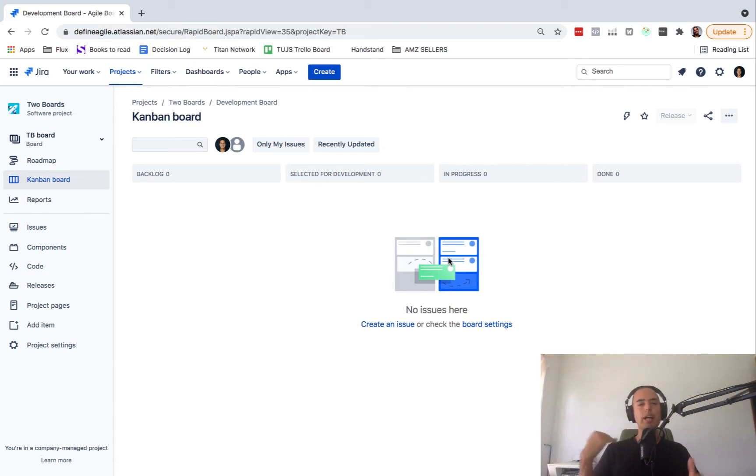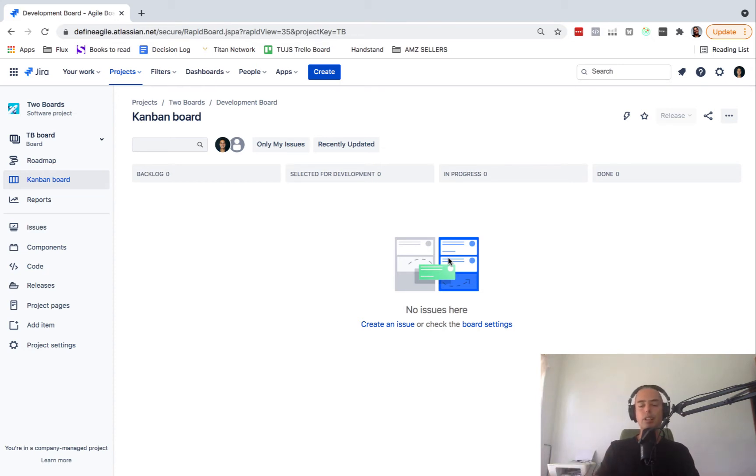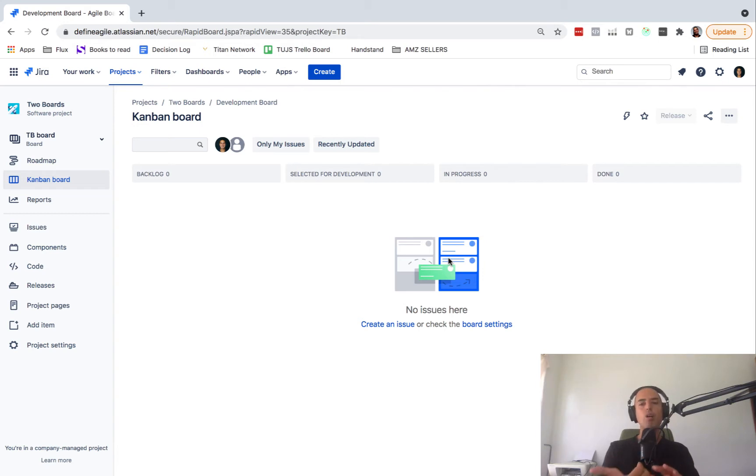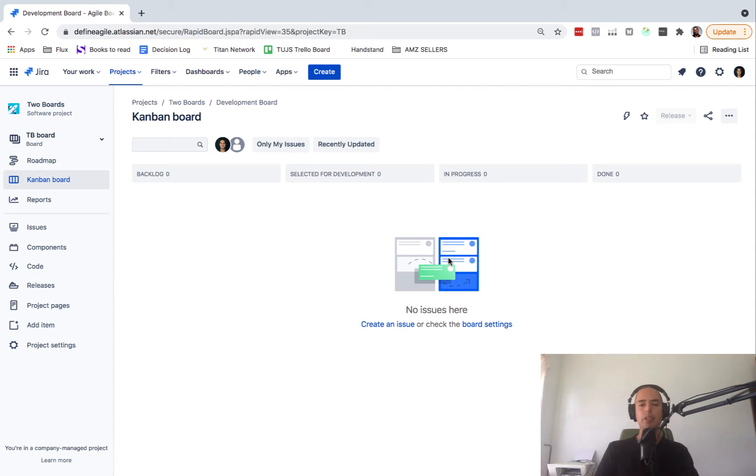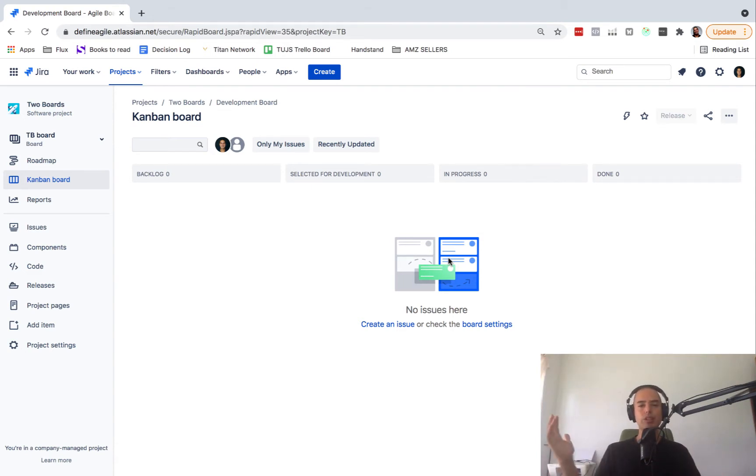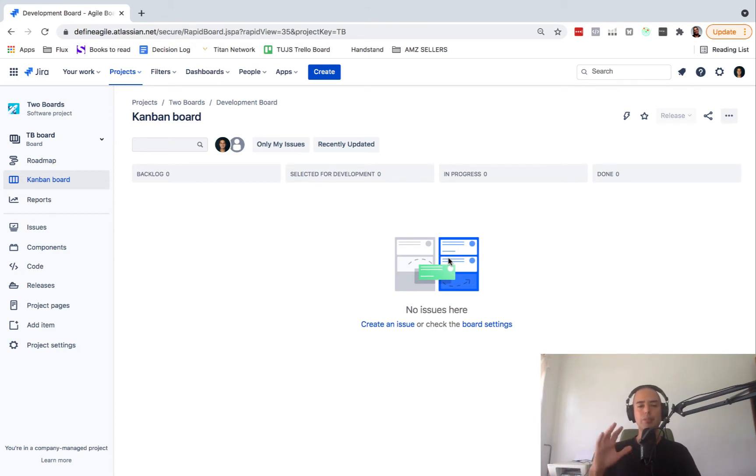If you did not know, you can create any amount of boards. For that you'll need to use software project, or it's also called now company-managed project or classic project, whatever version you are. Those three things. Don't use next-gen project and don't use team-managed project. Please use classic project for this to work.